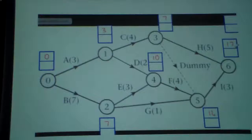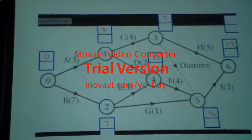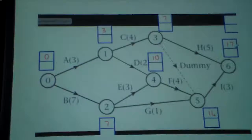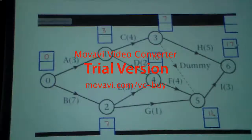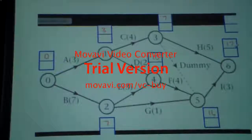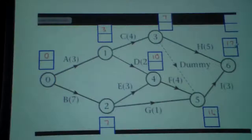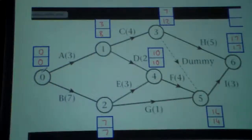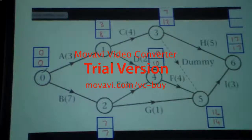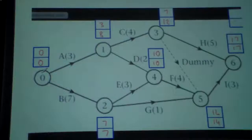From node 5 we have 3 entrances. If we take 10 plus 4 is 14. If we take 7 plus 1 is 8. If we take 7 plus something is 7. But we have to take the largest one, so it should be 14. Again, from 14 plus 3 is 17 — node 6. It is 7 plus 5 equals 12, or 14 plus 3 equals 17. We have to select the largest, so 17. Now the forward pass is over. Next step, we have to go back. So down we take 17. 17 minus 5 is 12. 17 minus 3 is 14.